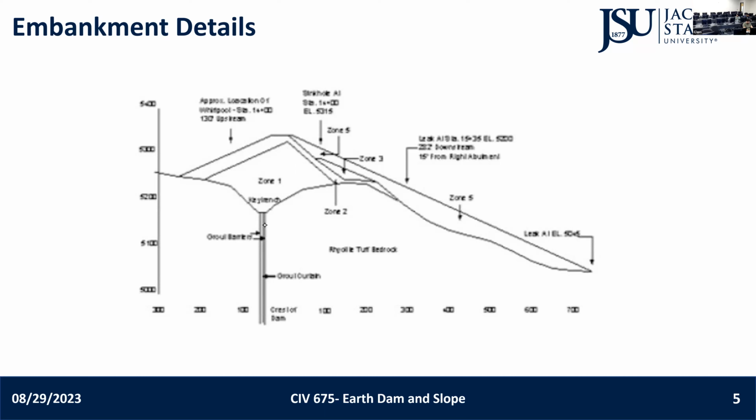But in the turnkey system, there is also a problem. It is actually applicable when the client doesn't know what he actually wants. Like in the normal system, we actually dictate everything that you have to do, specifically this and this. But in the turnkey system, we just tell them, build a dam here. Now it's your duty. So it has pros and cons, like you don't have control over the money or the costing.